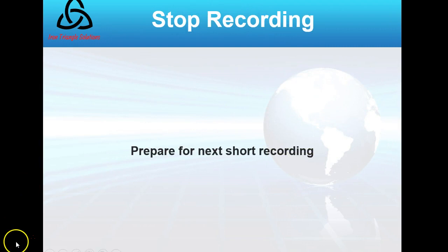That's it for Create WBS, which as an output gave me my scope baseline. My scope baseline is formed by combining the scope statement, WBS, and the WBS dictionary, all the details within a WBS box, who owns it, what's the time limit, what are the technical requirements, what are the quality standards, and on and on and on. That's the work breakdown structure dictionary. And the three of those pieces, scope statement, WBS, and WBS dictionary, form my output of create WBS, which is my scope baseline. Okay, thanks.